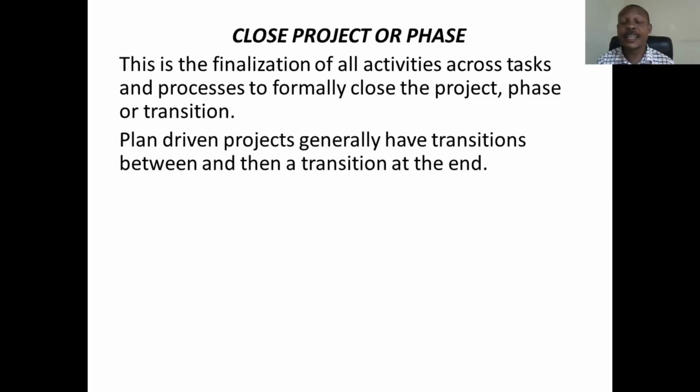Then in the end of the project, you should be able to tell us that we have finally come to the end of the project or the end of the phase. If you still have hanging issues in your project, you can't assume that the project has come to an end. For instance, you're not done paying your clients or your contractors. Maybe you contracted some people to supply materials to you to do one or two stuff. You're not done paying them, the project is not done. You're not done paying your staff, settling your staff, you're not done with the project. You are not done with the documentation, then the project is not done with.